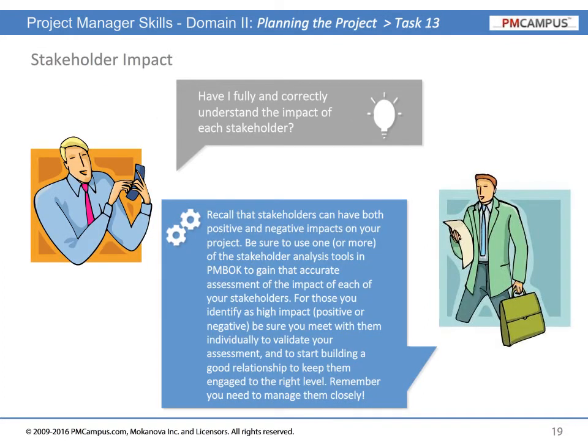Have I fully and correctly understood the impact of each stakeholder? Recall that stakeholders can have both positive and negative impacts on your project. Be sure to use one or more of the stakeholder analysis tools in PMBOK to gain an accurate assessment of the impact of each of your stakeholders. For those you identify as high impact, be sure you meet with them individually to validate your assessment, and to start building a good relationship to keep them engaged to the right level. Remember, you need to manage them closely.